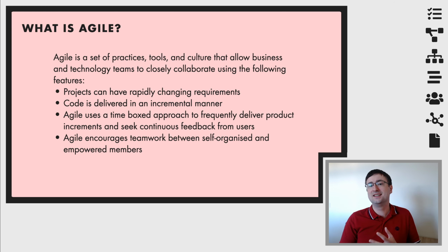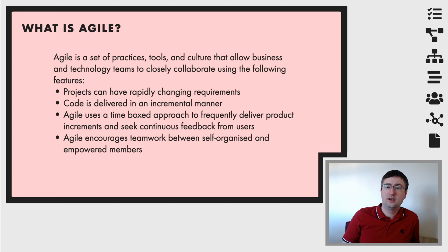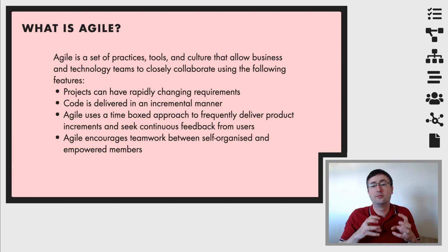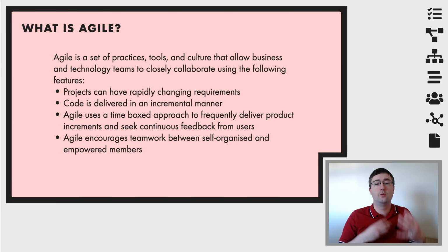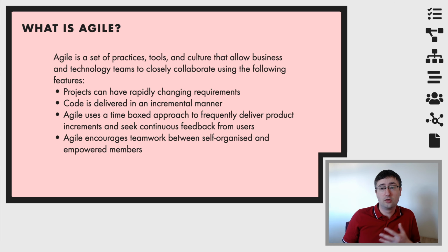Agile takes these ideas, but then also applies a number of different principles to it as well. It creates this time-boxed approach where we can start to understand a little bit more about how we can deliver products to customers. So we can say to them, at the end of an X period of time, let's say a 2-week period, we will give you the product and we'll show you what it can do, and then you can give us feedback. We'll then work on your feedback and then we'll add on more features as well. Compare this to a more traditional approach where you would be given a project to do and you wouldn't actually get feedback on it until the very end.